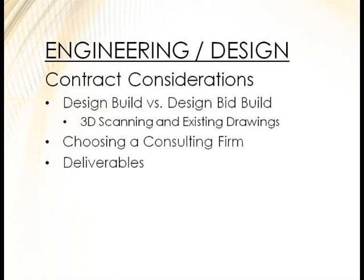Choose a consulting firm with the capability, knowledge, experience, and track record. Good response time during the construction phase really helps. Also, make sure you're clear on deliverables — you want detailed engineering drawings. Make sure it's in your contract that you get all the drawings you paid for, so in the future you're not starting an expansion without the information you need.